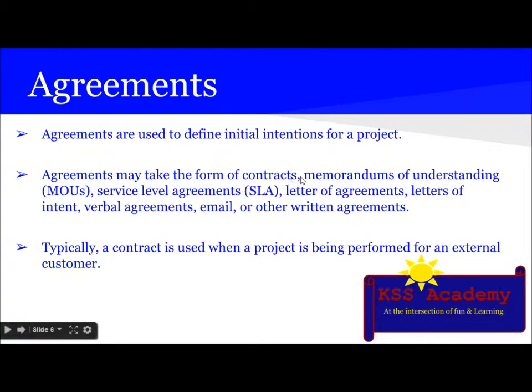Agreements may take the form of contracts, memorandum of understanding, which is also called MOUs, service level agreement, which is called SLA, letter of agreement, which is just a letter of agreement, and letters of intent, verbal agreement, email, or other written agreements. Typically, a contract is used when project is being performed for an external customer.